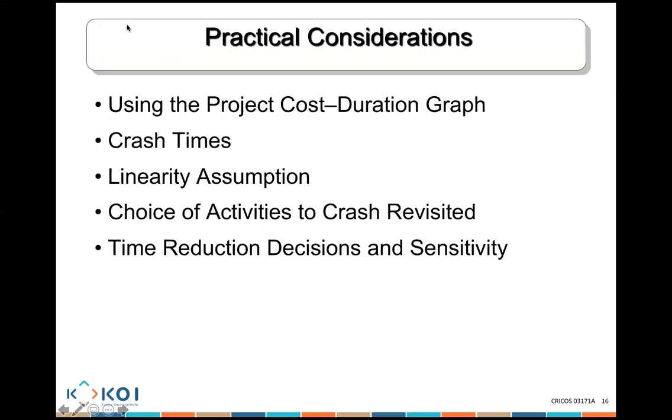All right, ladies and gentlemen, we're continuing from those calculations. A number of practical considerations you need to bear in mind when you're trying to do the crashing. Using the project cost duration graph is beneficial, but it's more beneficial to do it at the beginning of the project, not after you've started and someone is imposing a very specific duration. If you can, think about crashing before you even start the project, when you've made the calculations. That's actually the best possible time.